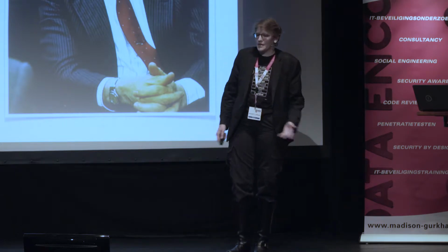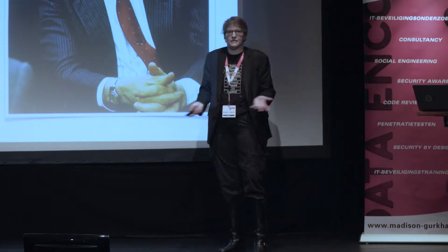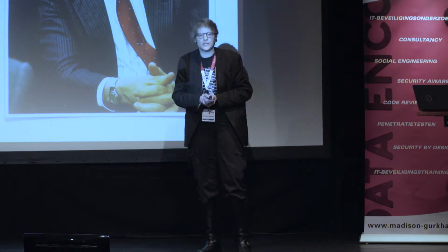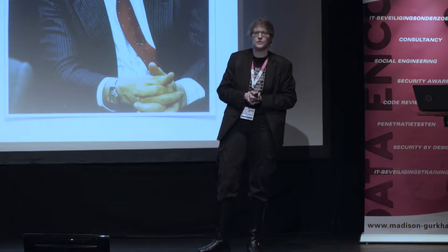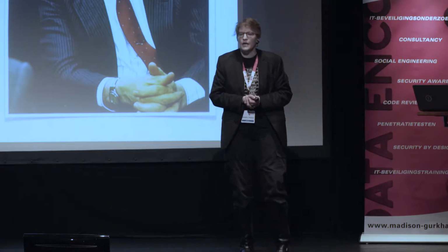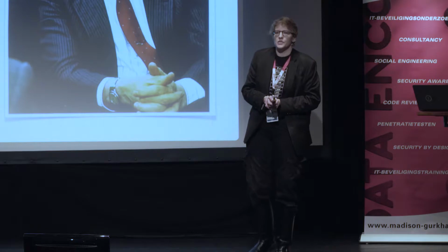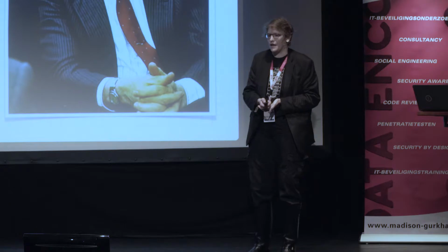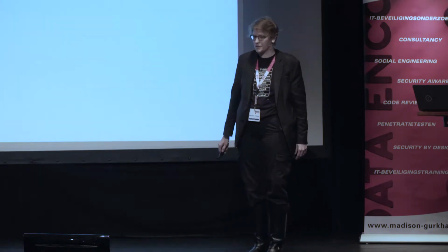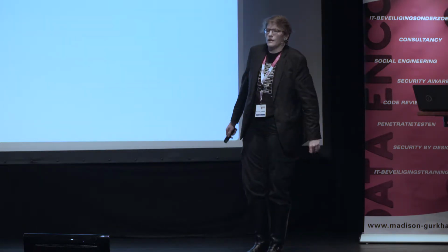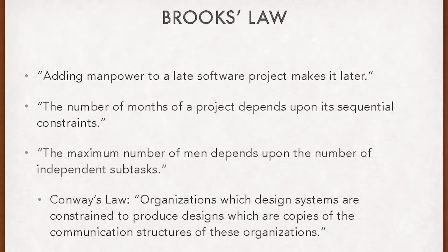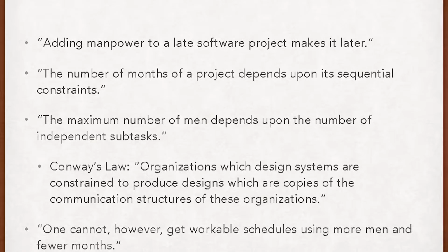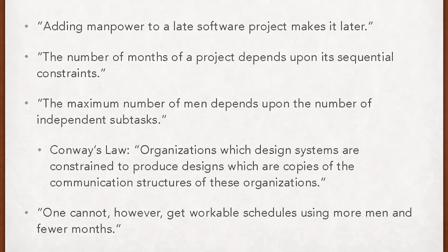He's got more honors than I can list in multiple slides, but probably his most well-known contribution to the computer science field is the book The Mythical Man-Month, which is largely drawn from his experiences managing the S360 and other IBM projects. This is the line for which he is probably best known: adding manpower to a late software project makes it later. I'm sure everyone here has run into this problem.